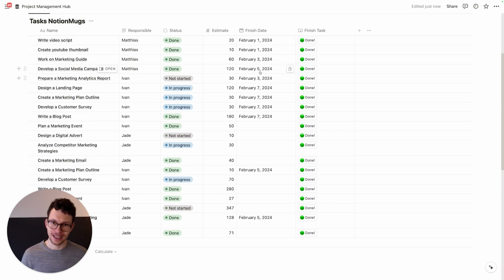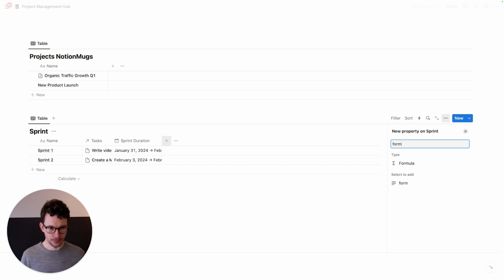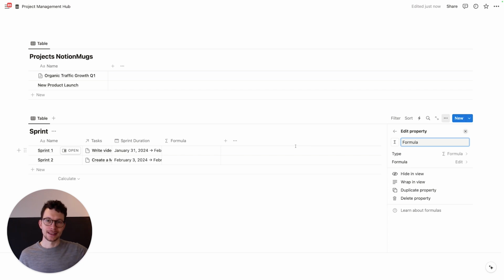All right, with these two things set up, we can now write a Notion formula that helps us automatically identify how many tasks were done on which date of the sprint. That formula can seem a bit intimidating, but we're going through it step by step, so you should have no problem replicating it. So let's start by creating that actual formula property. And we'll need to have several formula properties per instance that we want to track. So in this case, we want to track this based on the different days on our 7-day sprint window. So we just label the first one day 0.